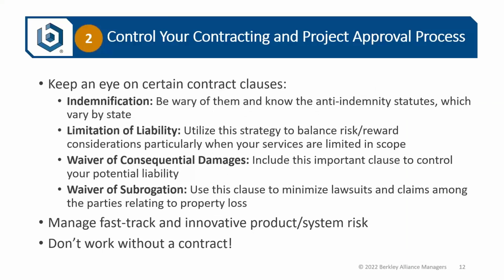When you're looking at your contracts, be wary of certain contract clauses such as indemnification. This is when you have to step into the shoes of an owner and defend them or indemnify them based on a risk that they should rightfully be taking. So you have to be very careful about limiting your indemnification obligations. There are anti-indemnity statutes in many states. They vary from state to state. So again, this is where your attorney, being familiar with those laws and the jurisdiction, needs to be consulted.